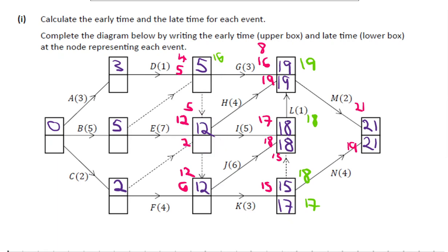So let's look at the 12. There's 19 minus 4 is 15 as one option. 18 minus 5 is another option, so that's 13. But we have this arrow here, so we actually have to deal with the bottom one first. The numbers I put there are not a waste of time, because they are the relevant numbers. We will very quickly get the answers to the rest of the top. So it's useful not to worry about the consequences until you've got the base of what we know in, and then see what else we need to find out.